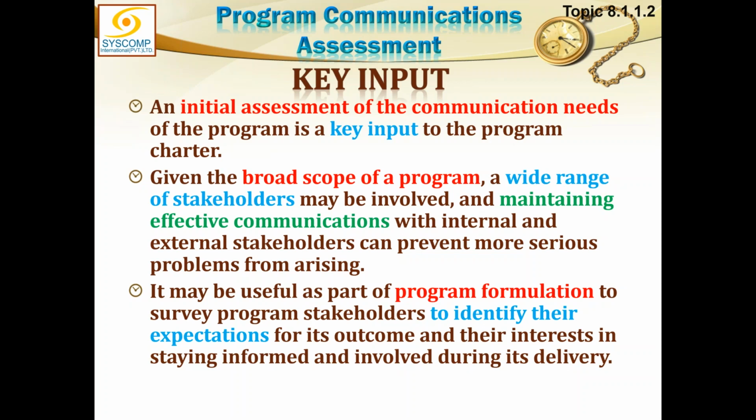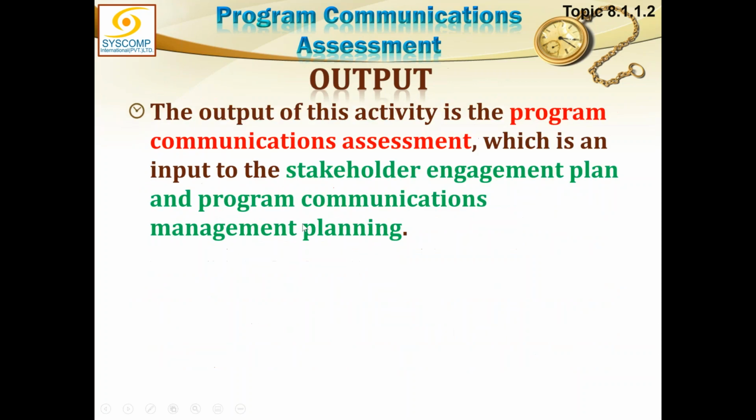We are trying to identify the program stakeholders and note down their interest, needs and expectations. The output of this activity is the program communication assessment. So at this stage, we will get the program communication assessment, which is an input to the stakeholder engagement plan, program communication management plan. So all these plans, both stakeholder and program communication plan, will be greatly influenced by this communication assessment.